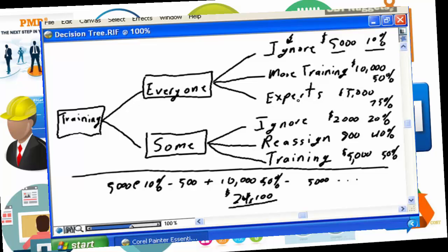And only in the actual project delivery situation will you be able to make the decision as to which one of these actions is appropriate, but you know the value and you have an anticipation of which action you're going to take. Therefore, you know what monies you should be setting aside, what the anticipated impact to your project is going to be of taking these actions. You know what you need to be setting aside to deal with this scenario should it happen in your project delivery situation.